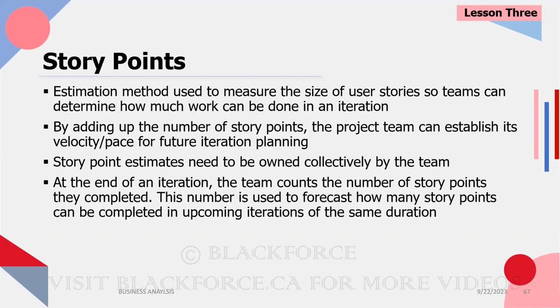But this time around, we choose 5, and 4 of those 5 are so complicated. In fact, in this next sprint, each of those user stories will take as much time as it took to build the entire 5 we had in sprint 1. So you can see why it's important for us to know the level of complexity of a user story.